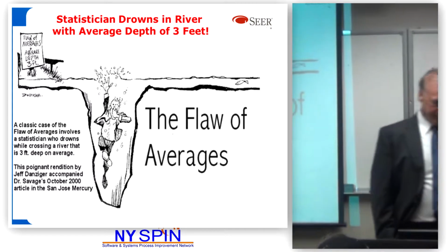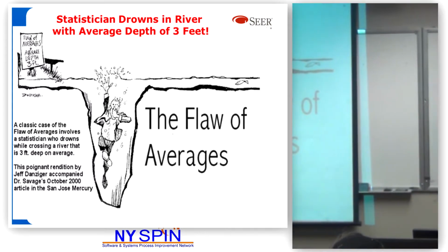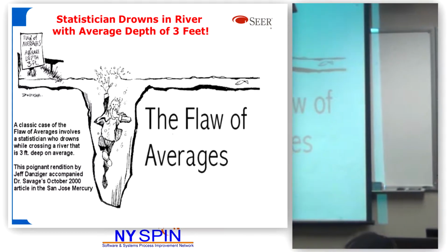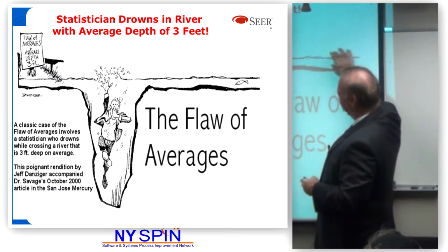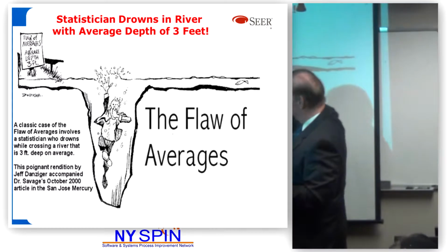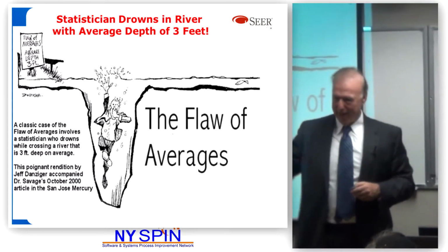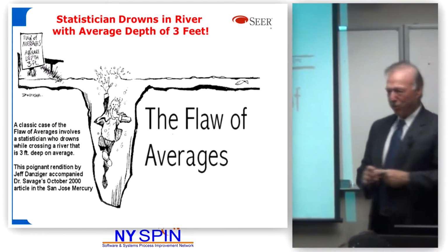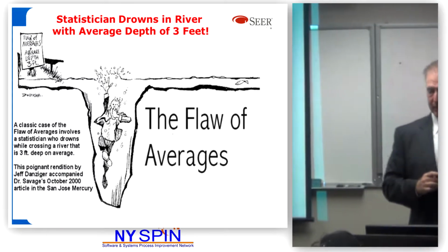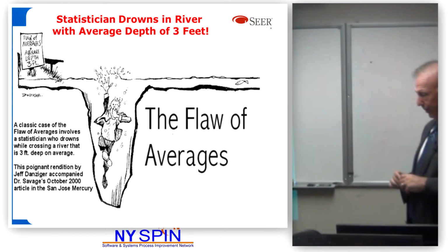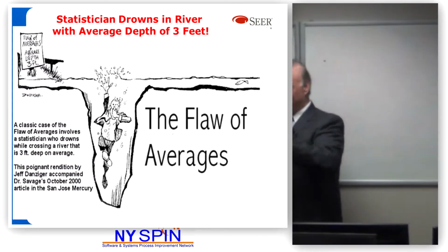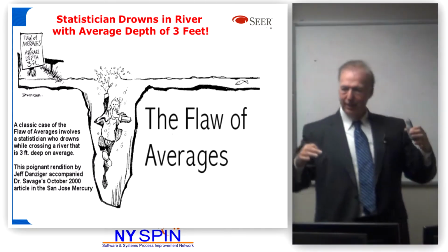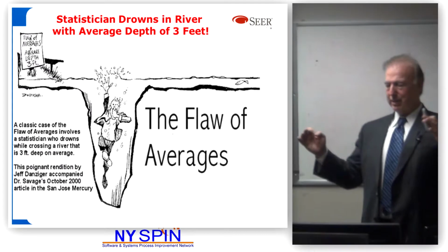People just using an average. Come on, that's funny. Let me explain why this is funny. Three feet of water average. Take the average depth of the water here. That's 10 inches, 10 inches, 10 inches, 9 feet. Average all together, it's 3 feet average water. The guy drowned. We get in trouble by just giving average numbers, just giving a single point, or estimating a single point, or doing affordability in a single point, because everything is a range. Unless something's all done, that's called accounting, not estimating or affordability. There's always a range in everything. There's a risk.